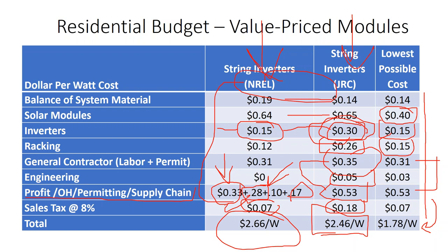But over the last 2 years, solar module pricing has not changed that much, but solar installation pricing has remained over $3 a watt. Even on the low end, it's more like $3.25 to $3.50 a watt, and on the high end, it can go over $4 a watt in some cases. Of course, doing project work in New York City is going to cost a lot more than doing project work in a no permit zone in a rural part of the country. But it shouldn't fluctuate by that much.